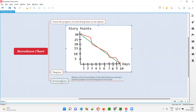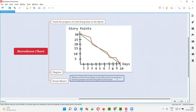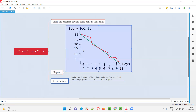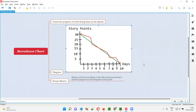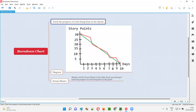The scrum master brings the burn down chart to the daily stand-up meeting. In this daily stand-up meeting, the complete agile team wraps up the meeting in just 15 minutes. The scrum master along with developers and testers discusses what work is ongoing, how much is completed, what is pending, and whether the team is on track to complete everything on time — all using the burn down chart to show the current status of the sprint.